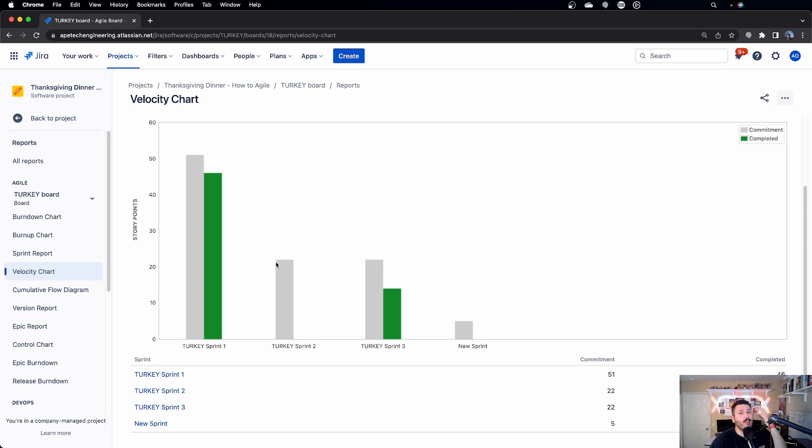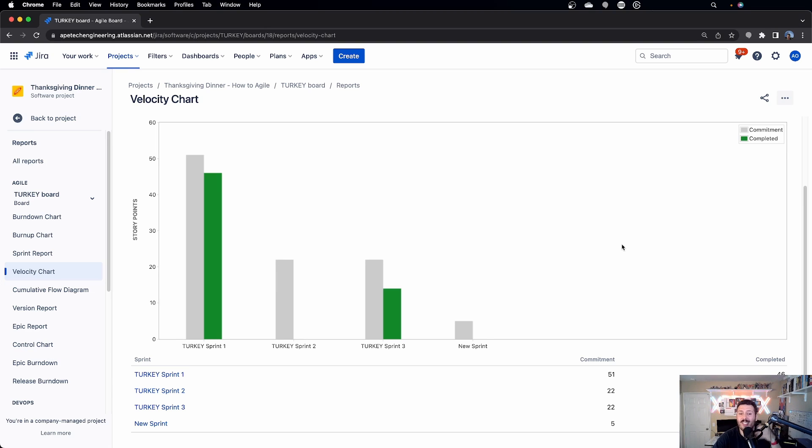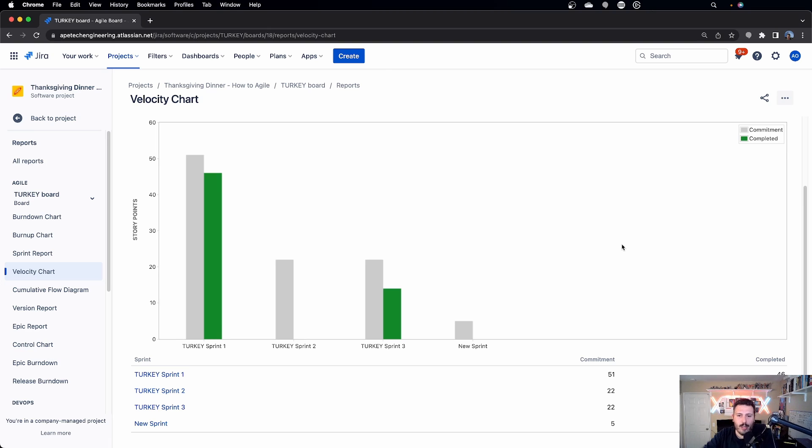That's a big red flag because why would your team commit to 50% less work? So unless it's like a holiday or some kind of company shutdown or you lost half your team, these numbers should be pretty consistent.